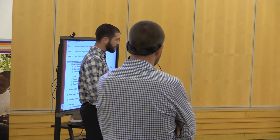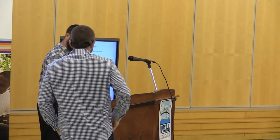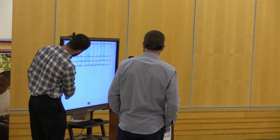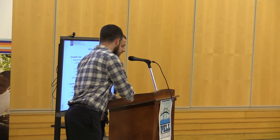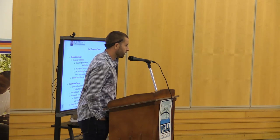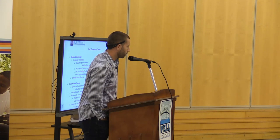Any questions before I let Jeremy come up and do his job? Thank you, Kyle. Try to keep this brief. In terms of municipality approvals, we received as of this morning Newport DPU's stormwater approval, which is great. At the tail end of last week, we received the RIPDES permit from RIDEM. So we've made it through our stormwater hurdle, which is excellent.